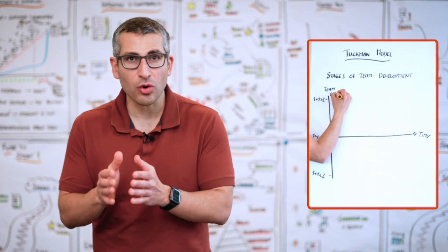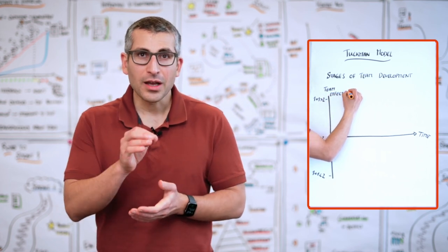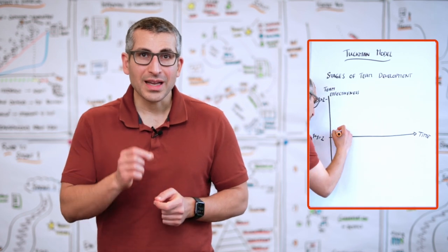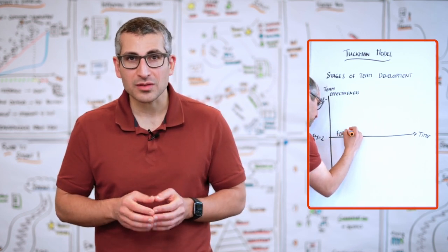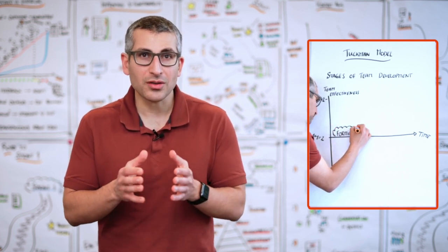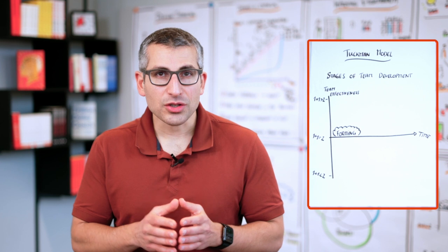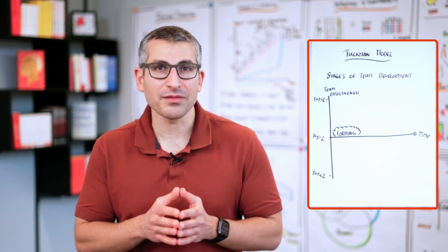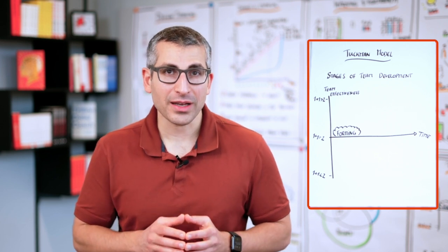Forming, storming, norming and performing. Forming is the stage when a team gets initially assembled. In that stage, there are no true synergies. There's also very little friction. So we draw them right on the baseline. In that stage, you usually observe almost every team member doing tasks individually. Very little collaboration taking place.